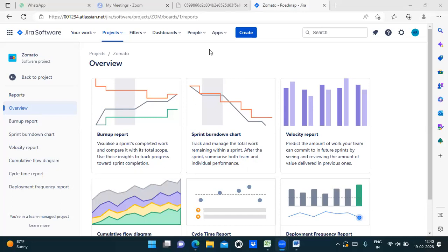All right, we'll take it up to the tech lead again. One mistake the team has made is that these discussions must be done during the planning meeting. You should not let the sprint begin if you have such kind of dependency, number one. Unfortunately, because the sprint has begun, we can't cancel the sprint, right? So parallelly, you should open another sprint and work only on those dependencies.